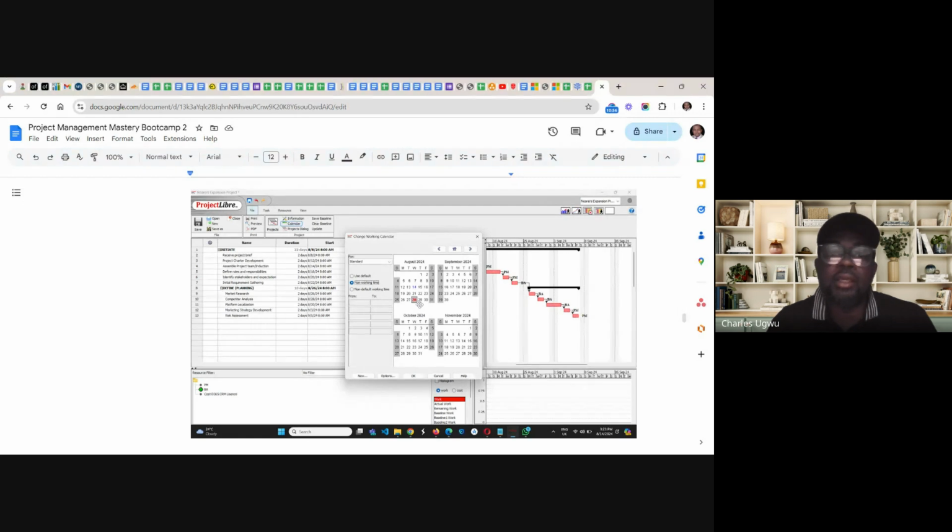Once you say okay, in your project plan, it's going to appear that 28th is a non-working day, although it's a working day, but it's a bank holiday, or maybe you don't want to work on those days. Or if you want to use it to plan for your specific resources, maybe you want to plan for a business analyst, you can try to understand when the business analyst is going on annual leave. So you can select those days, come to your project, highlight them, and save them as non-working days.